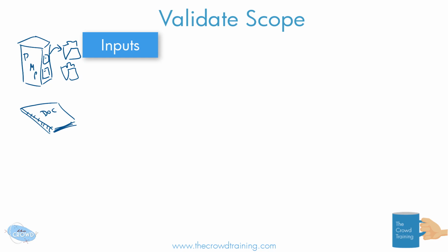Also, we need some verified deliverables, so let's make a wheel, and I'll put some measurements on there or something like that. But what we're doing here, when we verify, not validate, but verify the deliverables, what we're looking at is the correctness. And that is part of our quality control, or the process of control quality. We're checking to see, was this the right color? Is this the right dimensions, weight, whatever that we're having to verify.